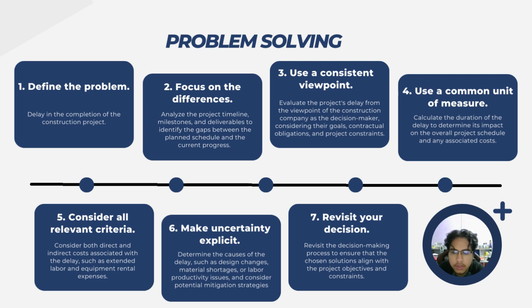The first one is to define the problem, which in our case, the issue is delay in the completion of the construction project. And then the second one is to focus on the differences by analyzing the project timeline, milestone, and deliverables to identify the gaps between the planned schedule and the current progress.